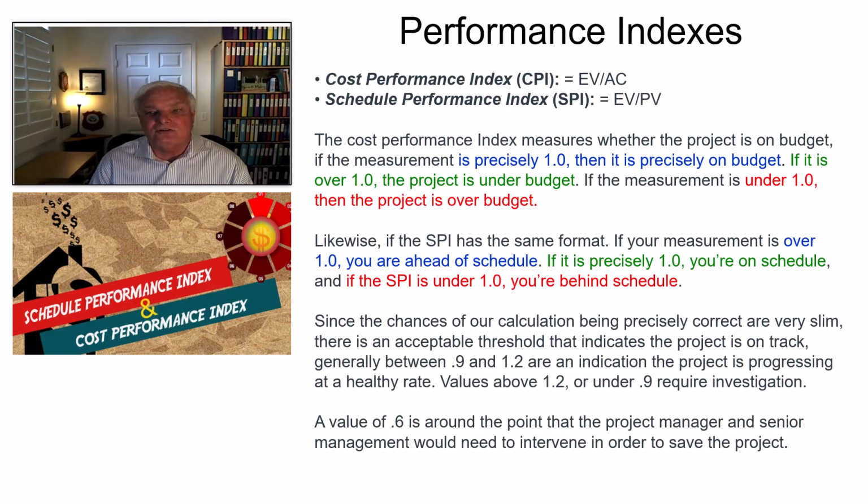If you are substantially below 1.0, by substantially, I mean, you're 0.5 or 0.3 or something like that, you need to really take a peek at what's happening on the project, and it may require a re-baseline.